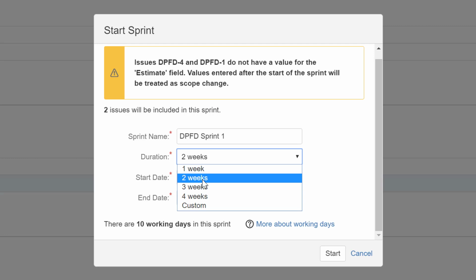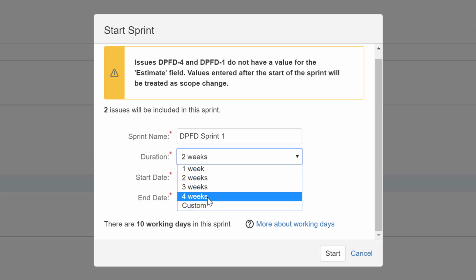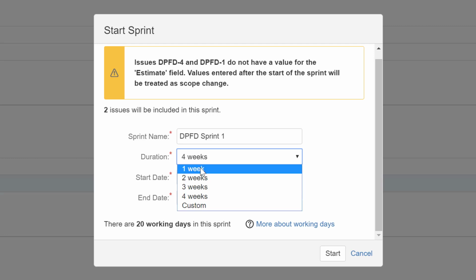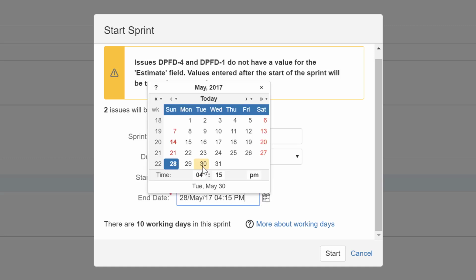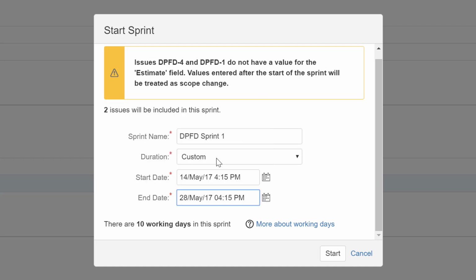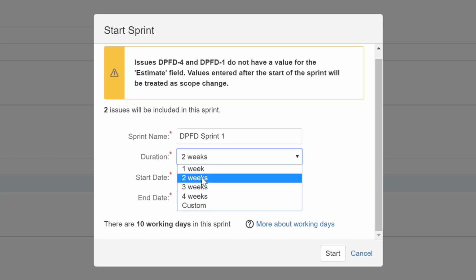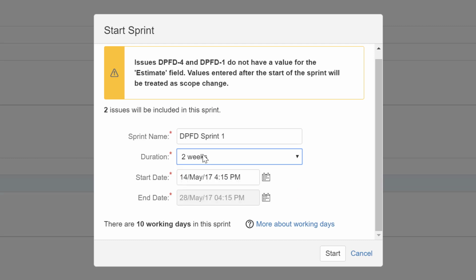However, if you're just starting up with Scrum, I would probably avoid 4 weeks. I would do between 1 to 2 weeks. But again, there is no right answer for that. Maybe 6 weeks is going to work for you. But definitely I would try 2 weeks the first time, because generally speaking, I can see confusion, and sometimes people don't really know how to use Scrum properly.